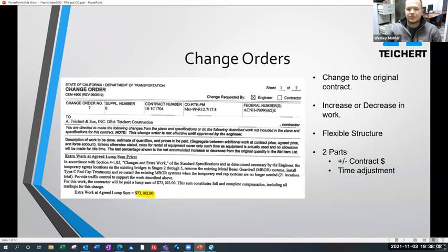The specials or specs will sometimes set a format for rates, right, for pieces of equipment or for labor hours for different trades. But in general, if you come to some sort of agreement with your owner, like, hey, we'll pay for this, you pay for this, or maybe it's just flat out, hey, you need to pay us for this work you haven't done, they're pretty flexible. It is legal, right? It has to follow California contract code and meet different requirements, but in general, if you come to an agreement with your owner, you can put it in a change order and then it's official. Then it's part of the contract and they have to pay you, or fulfill those terms. And the contractor has to fulfill those terms as well.